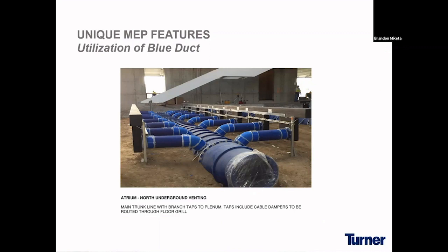Years ago, clashes sometimes were not discovered until install was occurring out on site, which would cause slower install times, increased labor costs, and sometimes wasted material. Working these clashes out in our 3D model ahead of time through the BIM process helps with the quality of the end product, the safety of the workers, limiting wasted material, and efficiency of the install. I'll go into more detail of examples of prefabrication in the shop environment of our subcontractors as well.